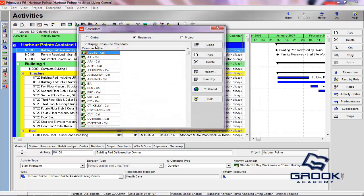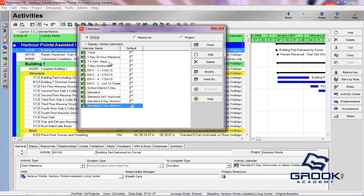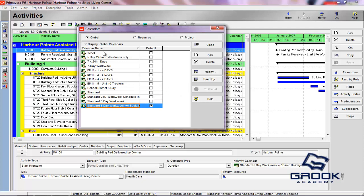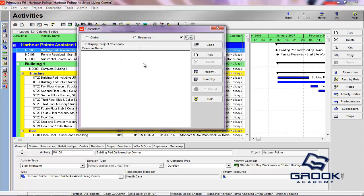You can also see here under the Global, these are all calendars that will be shared and are globally shared amongst all users of this installation of Primavera P6. And then you'll have project-specific calendars.